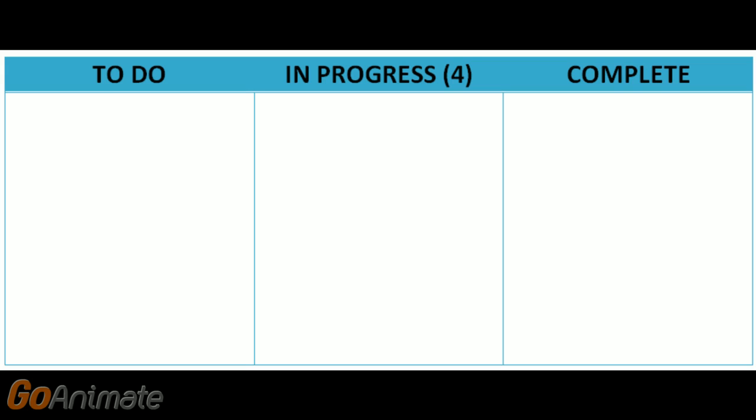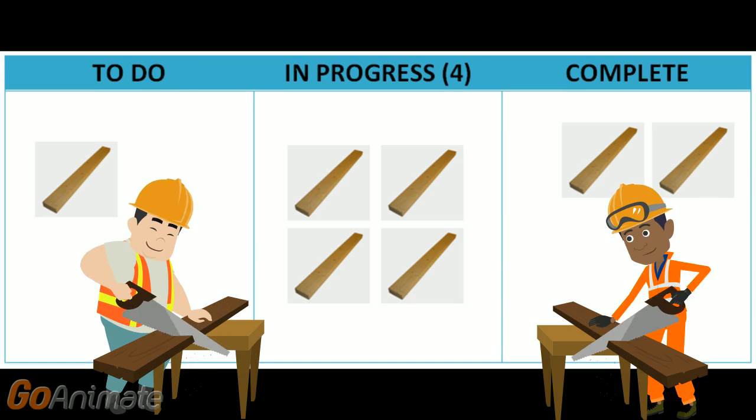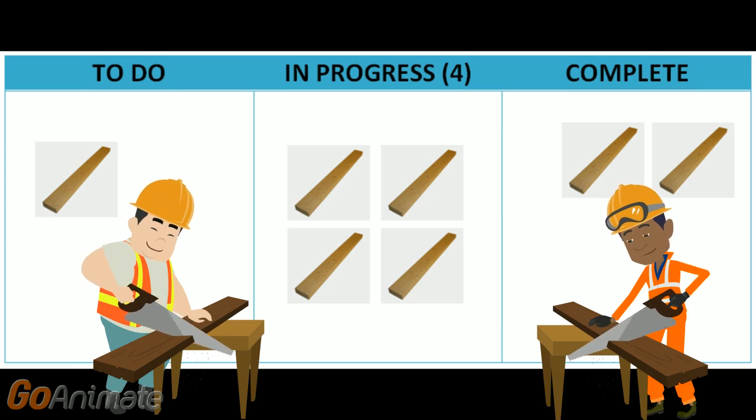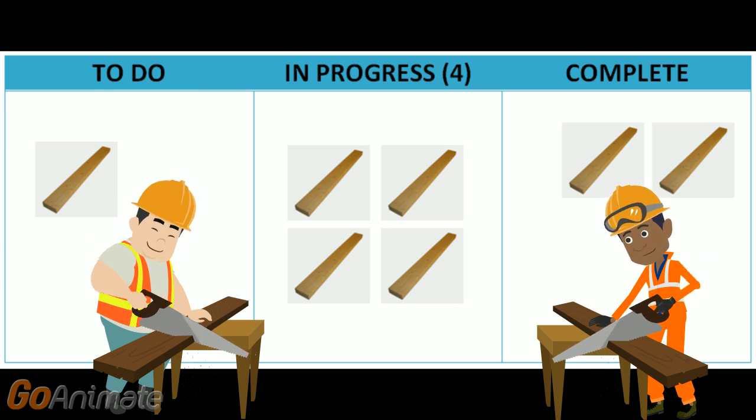The most basic Kanban board will have 3 columns: work that needs to be done, work in progress with a previously determined limit, and finally, work completed. As a work in progress limit is reached, bottlenecks become easily identifiable and resources or workers can be transferred to ensure that the work is done efficiently and on time.